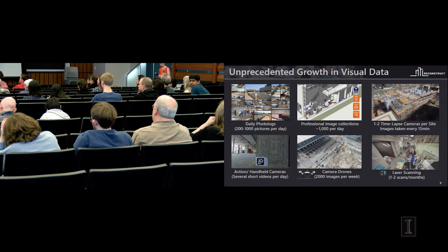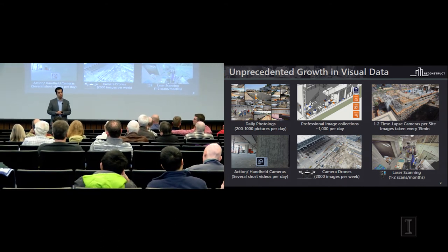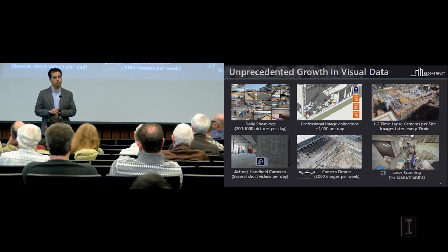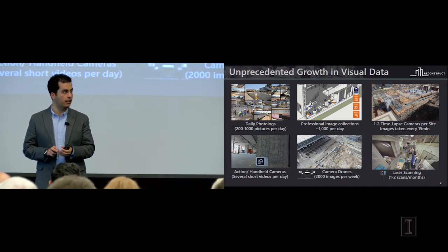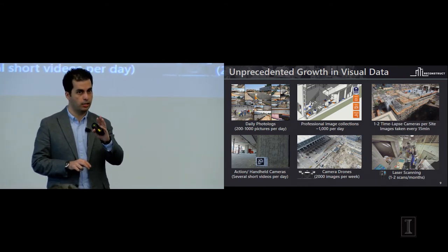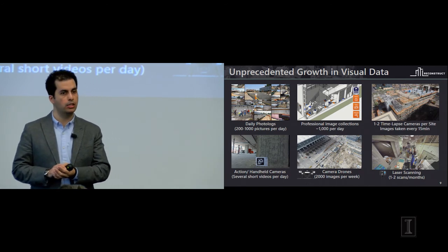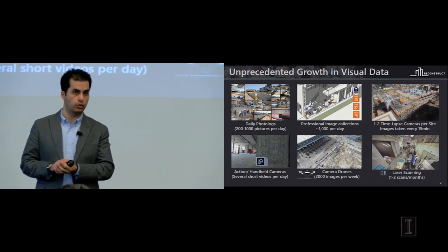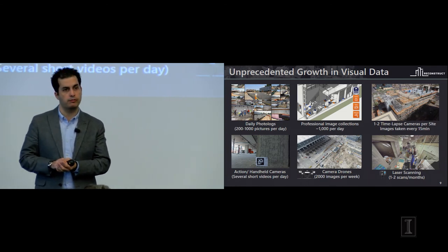That's a great question. So often before starting the operation with these drone operators, we do a walkthrough on the job site to make an assessment of potential issues that we're going to have. The example that I showed in Chicago was actually in downtown Chicago. So we were expecting to have a lot of interference in GPS. And in many cases, the drone operator completely manually operated the drone. But in other cases, I didn't show any project in Texas. We do have a few projects there.